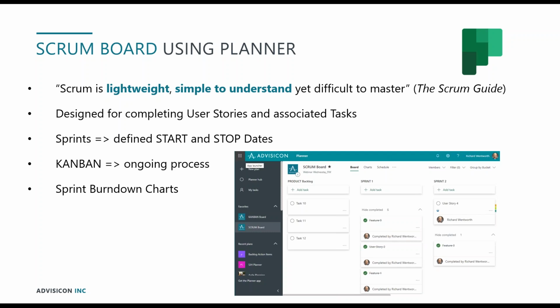As I showed before, there's linkage that you can set from Microsoft Project over to a Planner board. On our side at Advisicon, we actually use the timesheets capability built into Project. We have a preference for keeping our project schedules relatively clean and thin. And when we want to have lots of detail, we'll create the linkage to a Planner board and use these task cards to provide a lot more detail. Because they're connected, you can easily have that linkage and have more detail, and then assign the work for these task cards out to the appropriate team members.